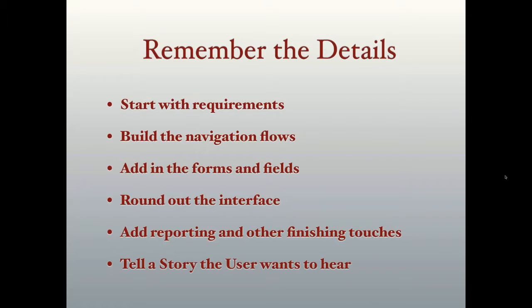So as we're going through and iterating, there are some things we have to keep in mind. We have to start with and remember the requirements. If we don't remember the requirements, the use cases and the focus of this whole thing, then it will get out of hand. We can add bells and whistles and other stuff, which is scope creep, and we want to avoid that. As we're building, we want to build the navigation flows, because those are the hardest to translate into words.